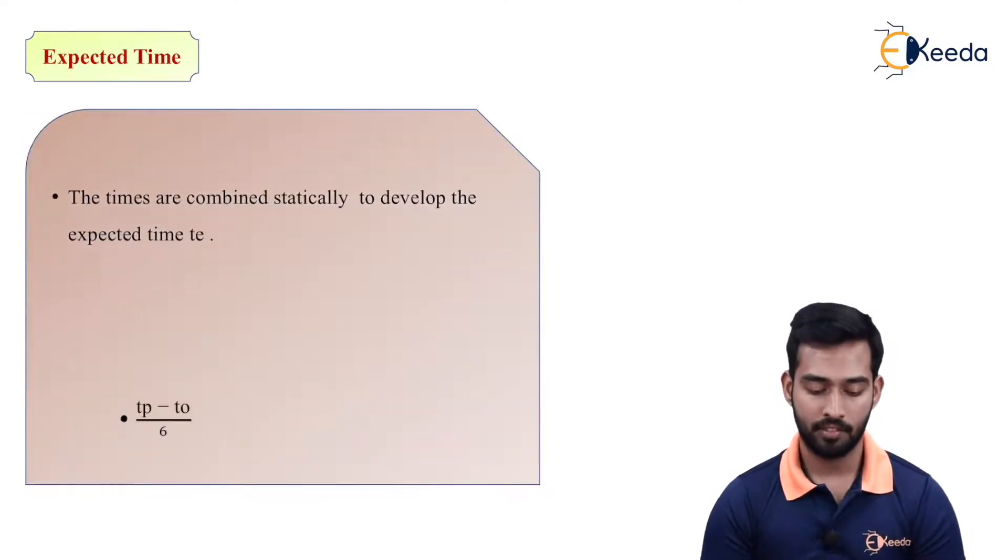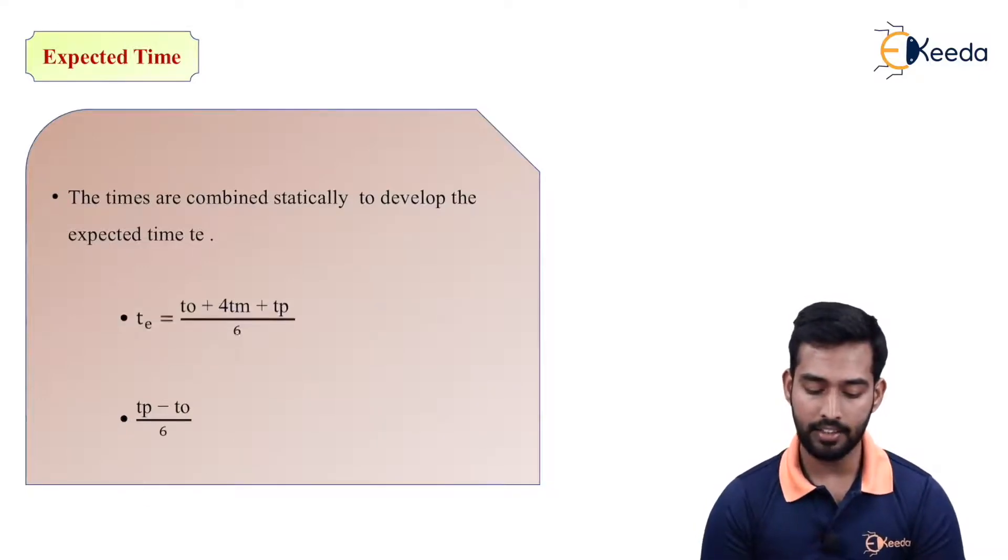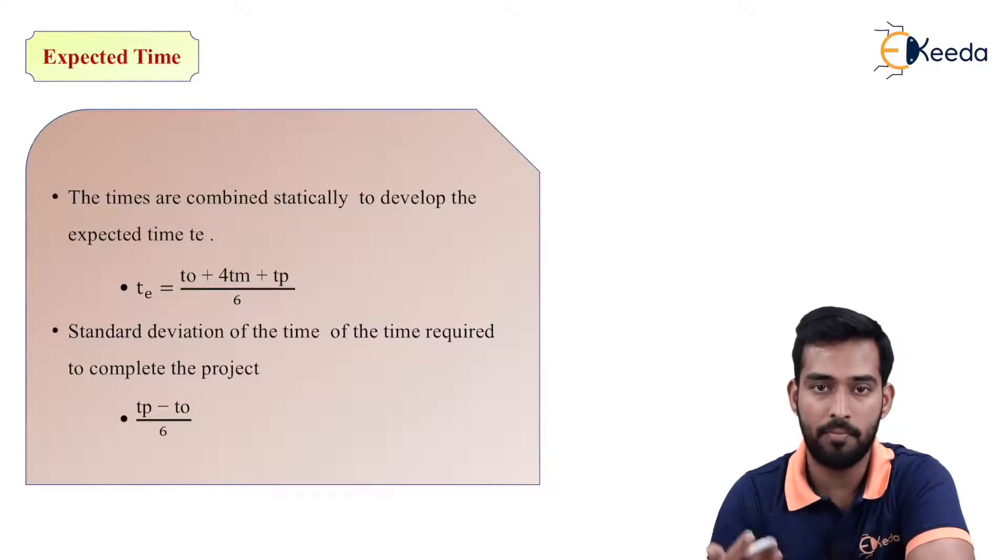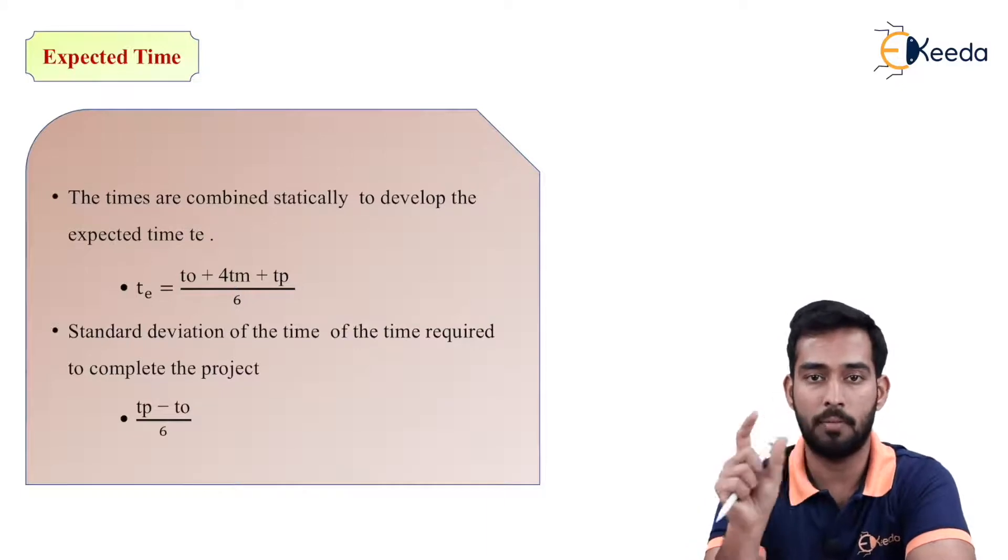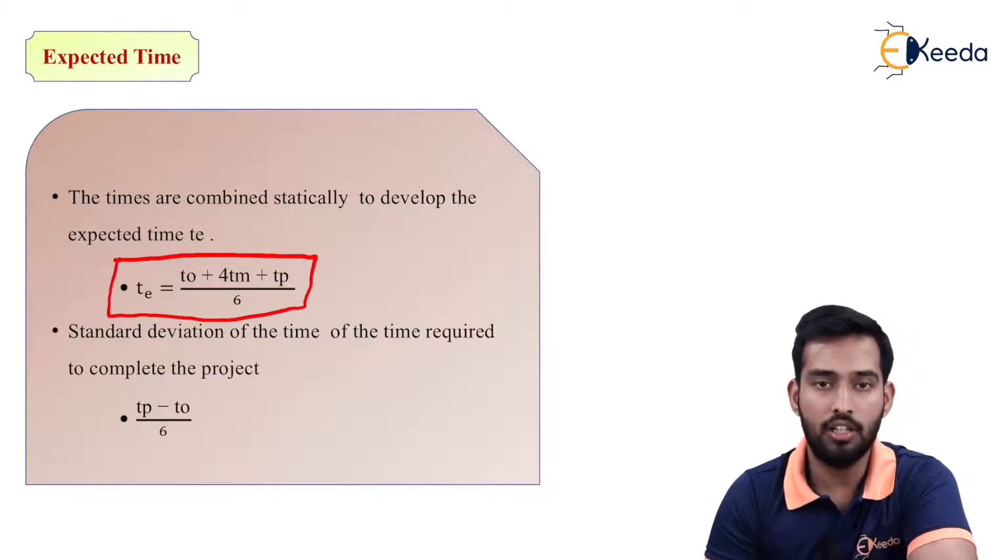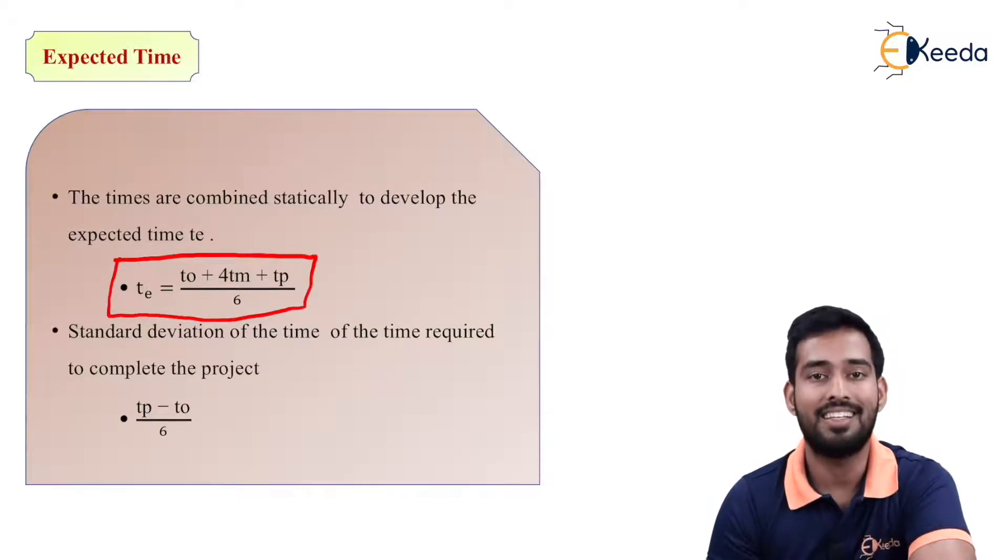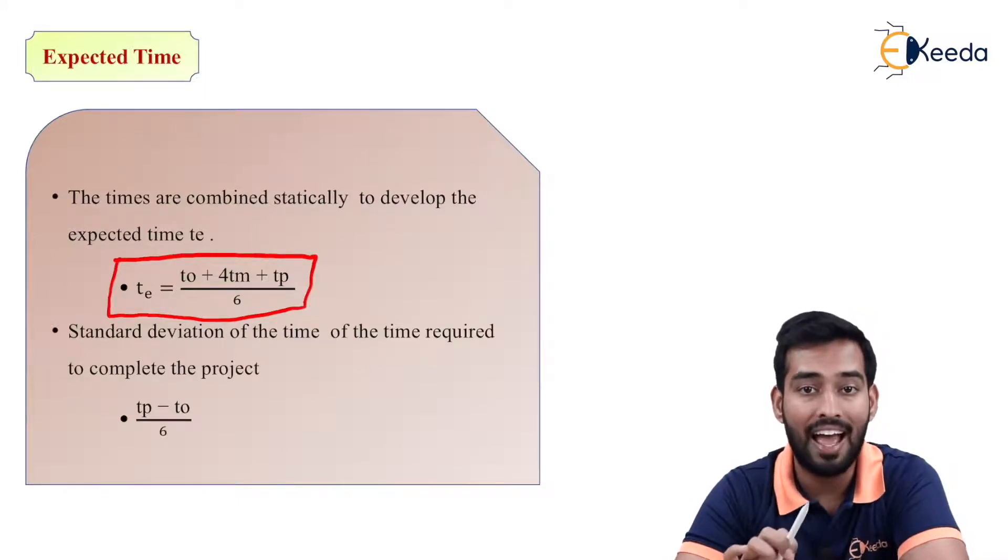Now expected time. The times are combined statistically to develop the expected time TE. So the formula to find TE: TE means expected time of completion. As we have three times, so we have to find the expected time at which the project will complete. The simple formula we have to use is TE equals TO plus 4 into most likely time plus TP divided by 6. This will give us expected time of completion of that particular activity.